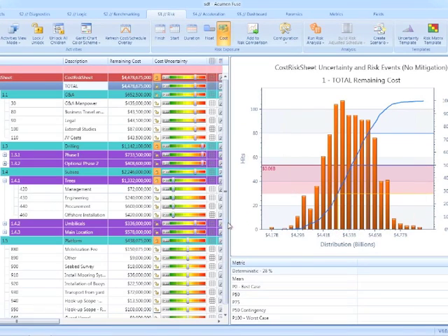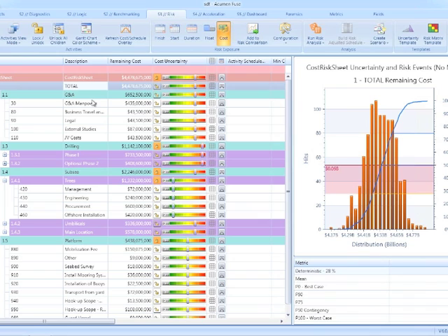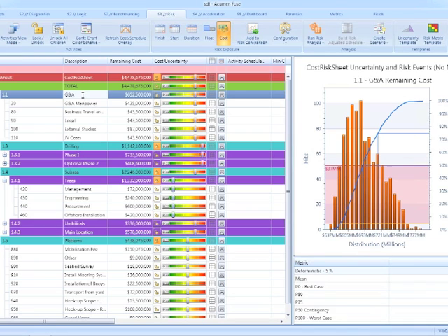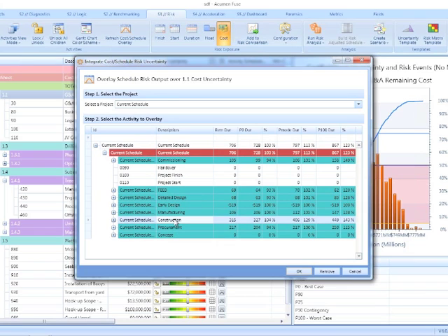Again, let me just show you a real-world example of this. So in our cost estimate here, let's go to maybe our G&A cost. We've got G&A costs, and let's assume that these costs are time dependent. Then it's as simple as saying we want those time-dependent costs to be driven by the schedule model, and perhaps it's not the whole of the schedule, but maybe just the construction period that is going to drive the cost.